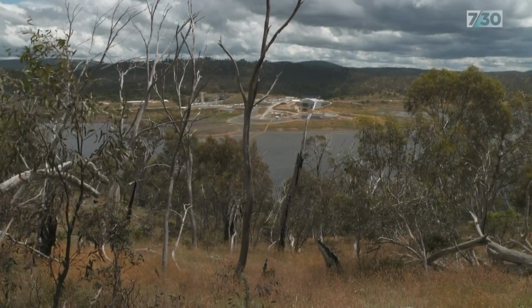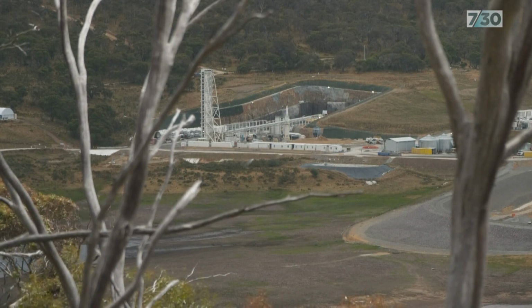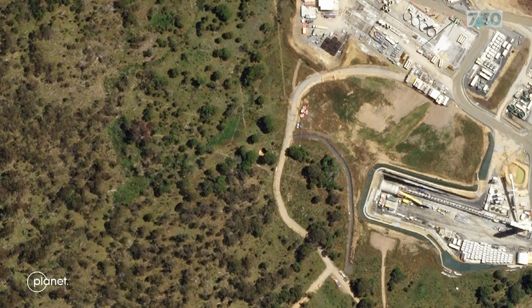Professor Simon Bartlett hasn't worked on Snowy 2.0, but he's a specialist on the engineering required for pumped hydro projects. Clearly they're going to incur challenges with soft ground, mixtures of rock and sandy, loamy soil, a lot of water runoff from the surface, and the machine was supposedly specially built for that. They thought that would take about 1.5 years because it's supposed to be able to bore 30 metres a day.